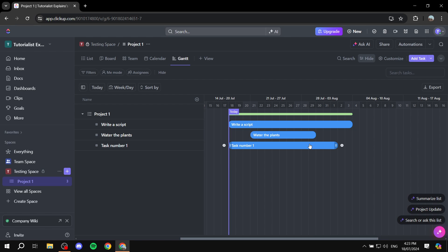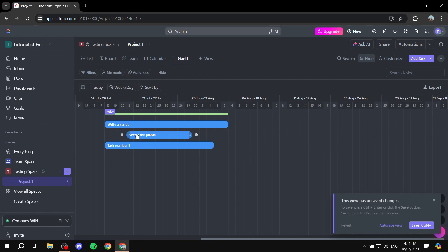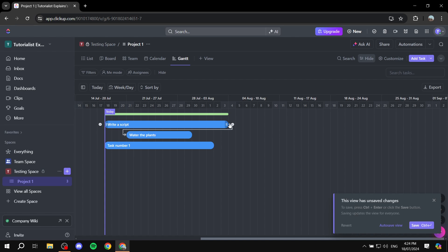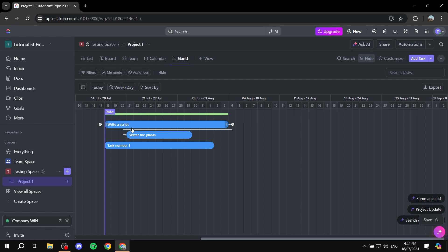Now we can start creating dependencies with the tasks we have. Tasks are connected via back and forward connections. Here, this is going to be the first one, and we can connect it to the back end of 'water the plants.' We have our first dependency — you can see it's a line connecting it to the next task, which is watering the plants. And then that one leads to task number one. We can connect it and see all our connections here.